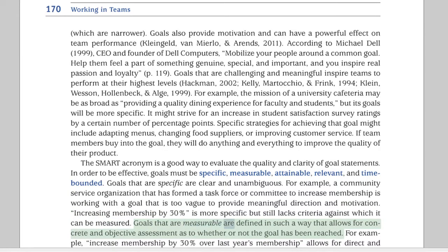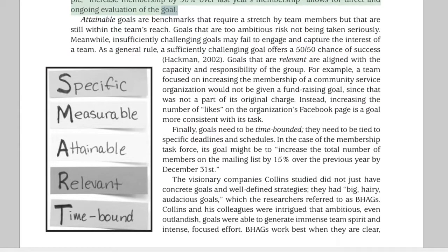Goals that are measurable are defined in such a way that allows for concrete and objective assessment as to whether or not the goal has been reached. For example, increase membership by 30% over last year's membership allows for direct and ongoing evaluation of the goal.